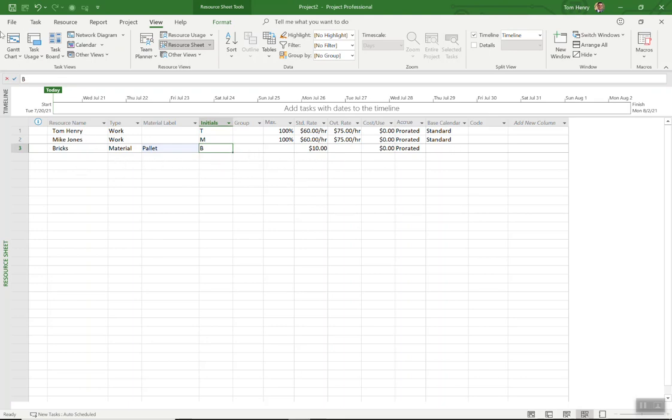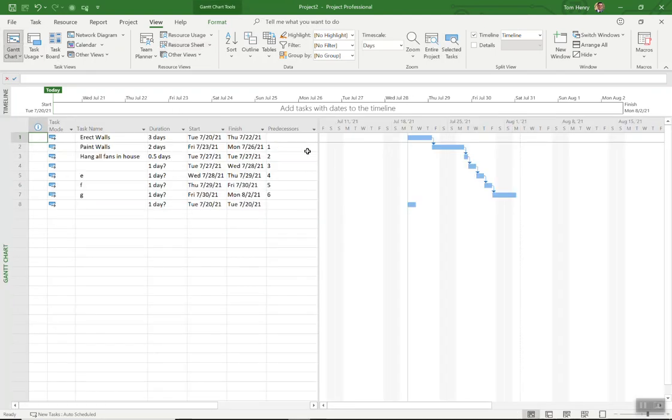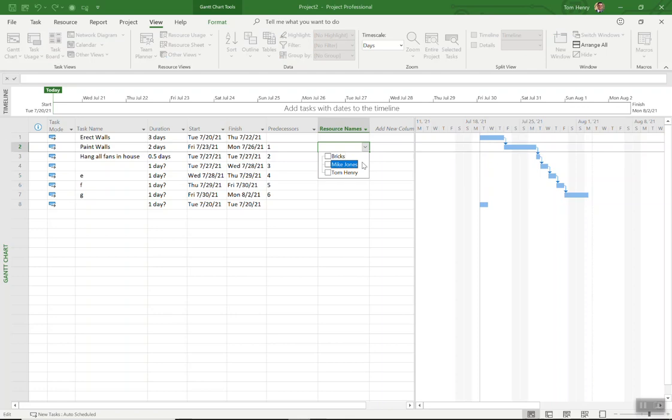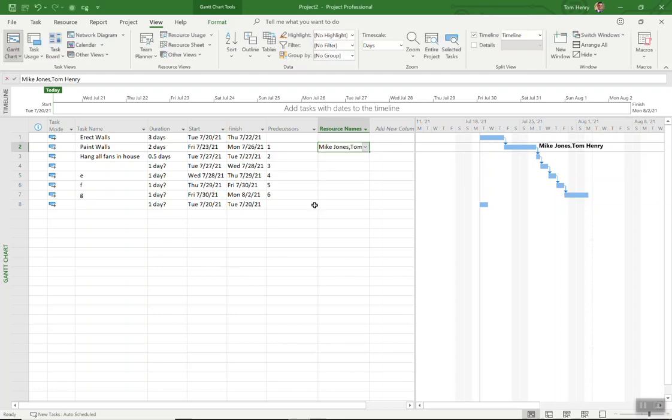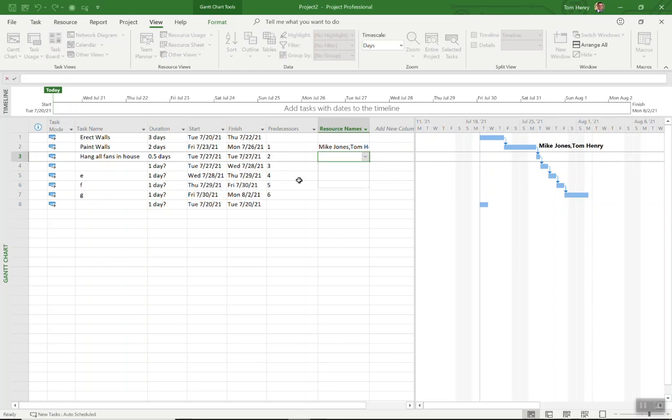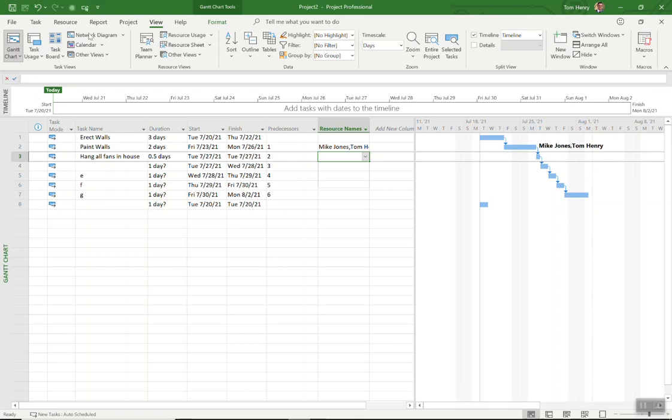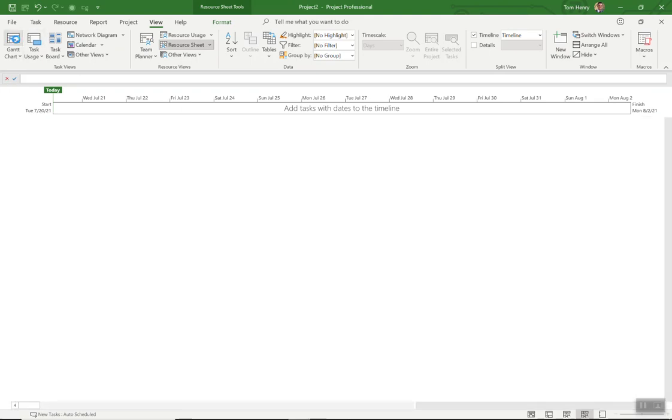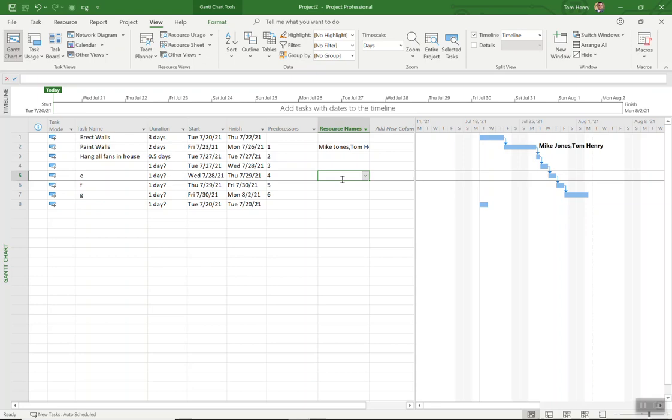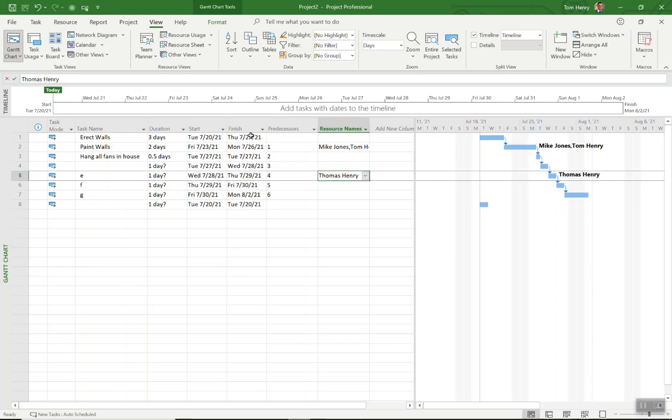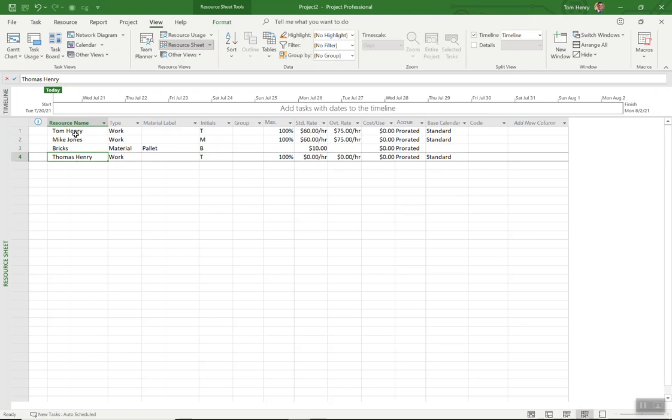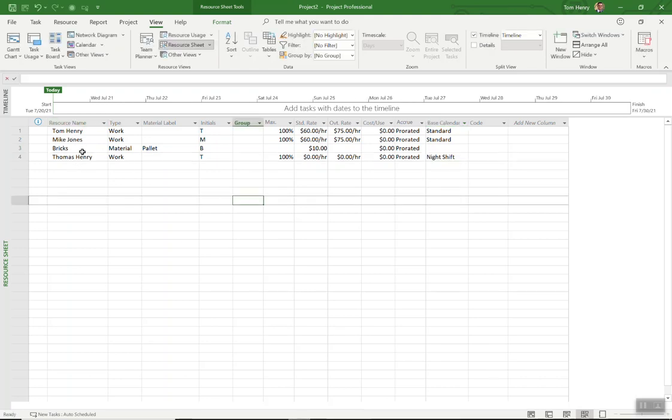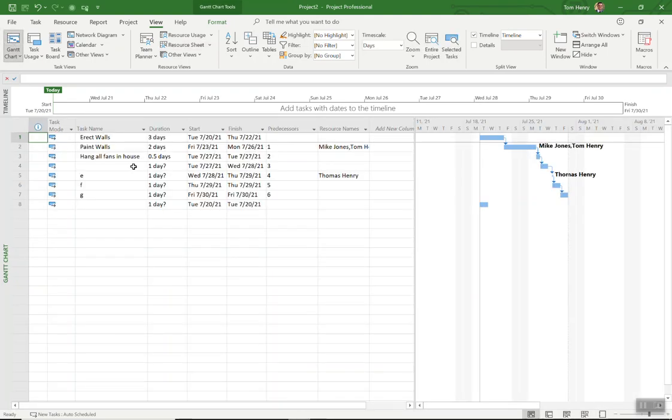Build out your resource pool and then leverage those resources in the schedule. You can see if I come out here, the resource names column I can then start assigning quickly and easily my resources. The reason I do that is exactly what I was saying earlier, you want to make sure that you're putting in the standard rates, aligning them with a calendar, overtime rates. If you're creating material resources what's the material label. What you shouldn't do is just come in here and type a name. I've got two Thomas Henry's now and it'll allow me to do that. The resource sheet I've got Thomas Henry and Tom Henry. What's better is Thomas Henry's free, which one are you going to use Tom or Thomas. He doesn't have the correct calendar assigned with him. Maybe he's on the night shift, not what you want.